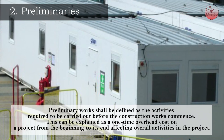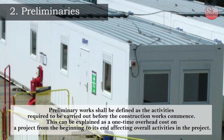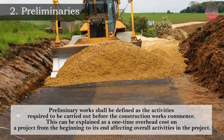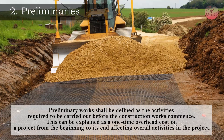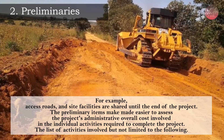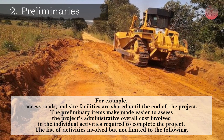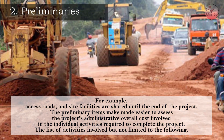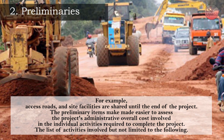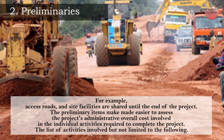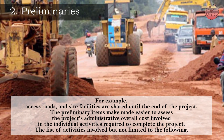Second, Preliminaries. Preliminary works shall be defined as the activities required to be carried out before the construction works commence. This can be explained as a one-time overhead cost on a project from the beginning to its end, affecting overall activities in the project. For example, access roads and site facilities are shared until the end of the project. The preliminary items make it easier to assess the project administration's overall cost involved in the individual activities required to complete the project.